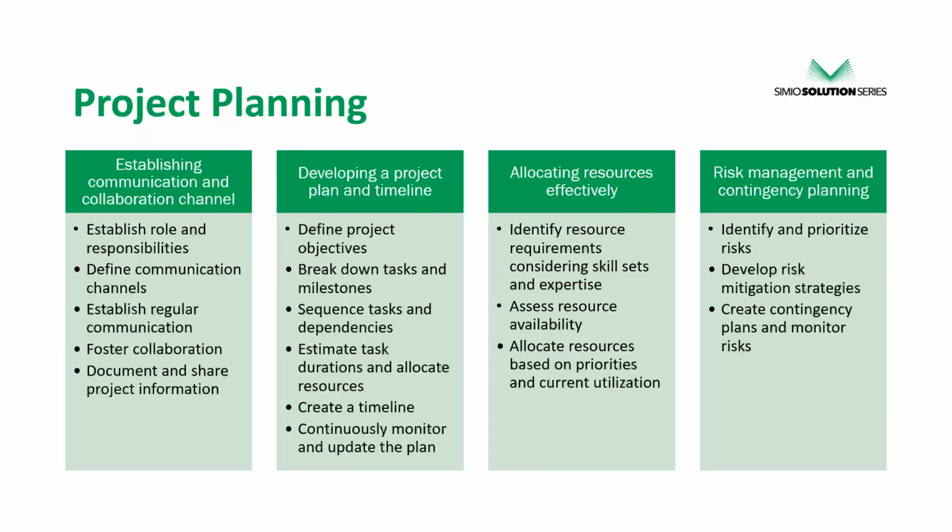But also this gives you an opportunity to modify the plan if needed to support the resources you have available, right? So if you have a modeler that you're hoping to have on this project, but their workload isn't going to allow them to be on the project for another month, then you could build that into the project plan, right? And maybe there are other activities that you could front load during the month that they're out and try to be ready for them when they come on board. So definitely looking at how you're going to allocate the resources to your project plan is an important step there.